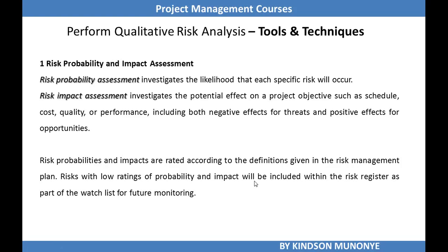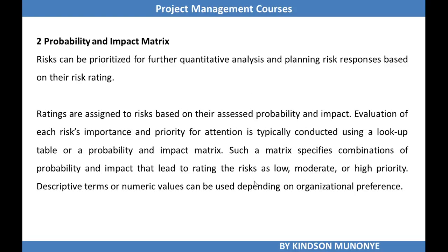Let me tell you a little about watch lists. A watch list contains lists of risks that are considered to be low priority risks. They are maintained in the watch list and monitored as the project progresses.